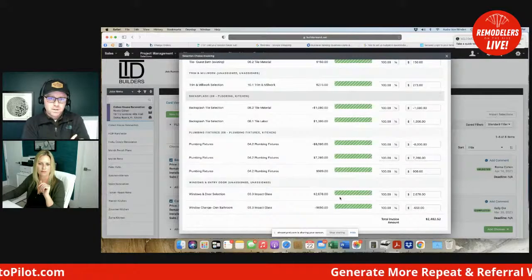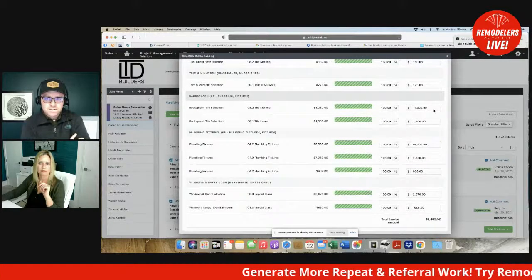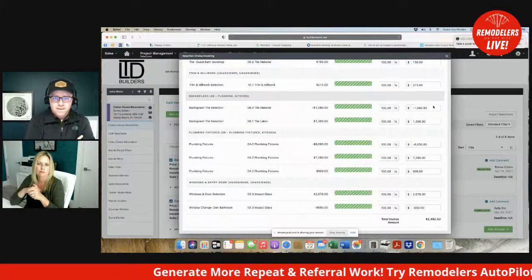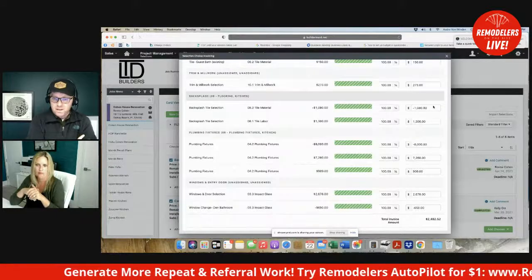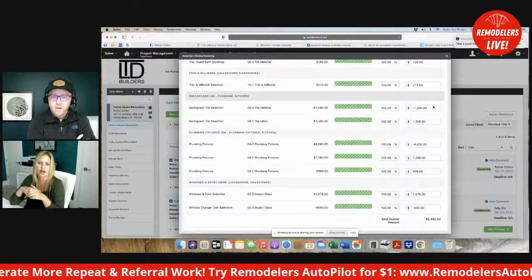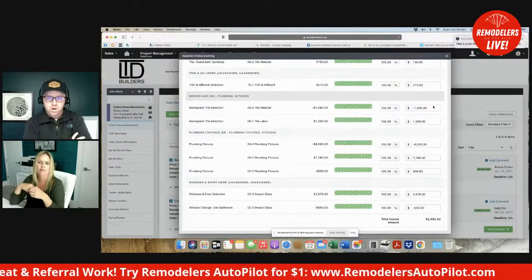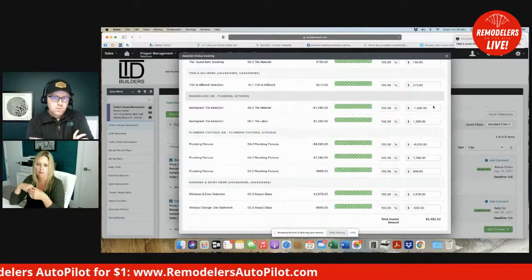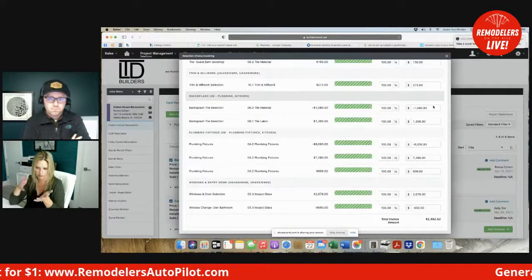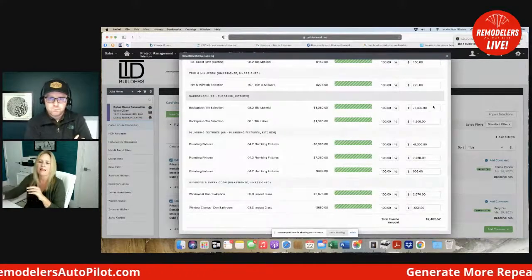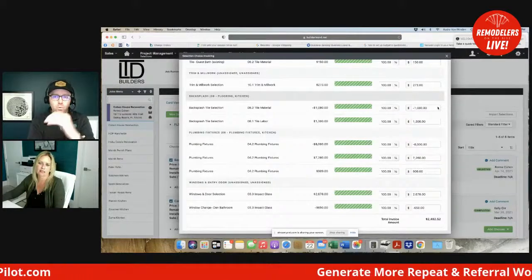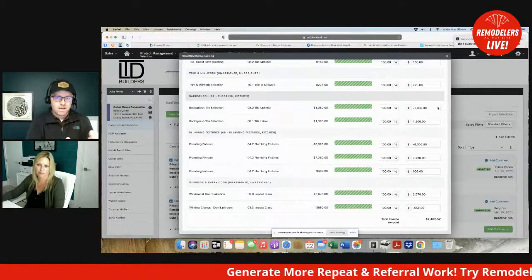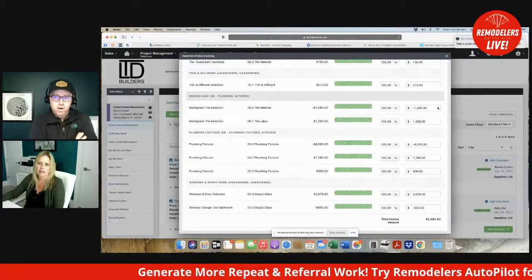The backsplash is a good example. So when I'm looking at this, we've got a negative 1080, which was maybe the allowance. Yes. And then we have the 1,300, which is the actual cost. So we're taking out the allowance, and here's the actual cost, and so they went over $220 on that. That's right. And that's why it was so important, the way that you were setting up the negative and the positive. This is a huge reason why that's important.